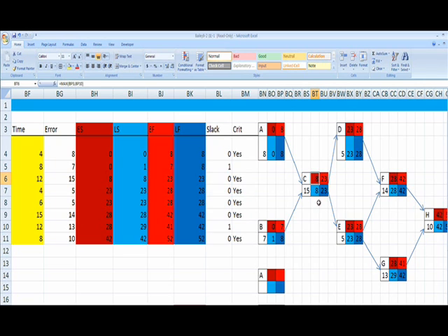Alright, so as you can see, we have 8 here. So this basically took the maximum because it's going to start the latest. It needs 2, so it's going to be the latest of the activity that takes the longest. So it's the max of these 2 predecessors. And you calculate the early finish the same way. Alright, and that's going to be your early start box plus your activity time box.